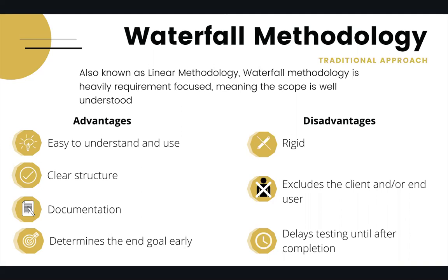When it comes to the disadvantages, the first one would be the fact that it's a rigid method, and what it means is that if there are any errors that are made and any changes required because of these errors, then the project has to begin from the start, and therefore it increases the risk of project failure.